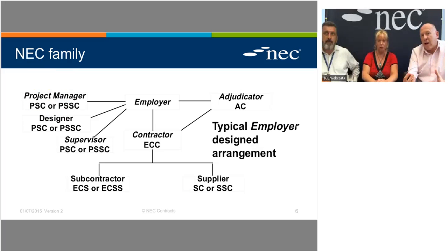In the creation of an asset in a construction project, we may be engaging somebody called a contractor, using the ECC typically, and the employer, where it is an employer-designed contract, is engaging something called a designer, as you can see on the left-hand side, using either the PSC or the PSSC to produce a design for the contractor to build. So in this model, the contractor is basically a builder.